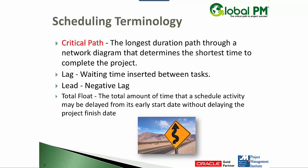Lead is a negative lag. So prior to the finish of A, let's say, we're going to go ahead and get started with B. Maybe three days prior to finishing A, we'll start B. So that would be a finish to start relationship with a negative three lag or three day lead.